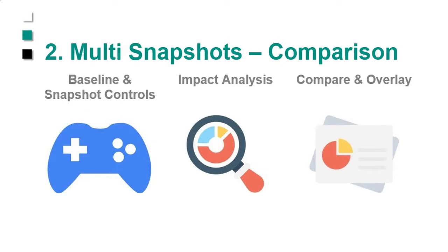It's very simple to do because it can even be automated. So if you do updates every Monday, for example, and you want the data snapshotted out on Tuesday to give folks time to get their updates in, we can automate that. We've got lots of clients that have it automated. Then the dashboards are up instantaneously after the snapshot and into your corporate system.